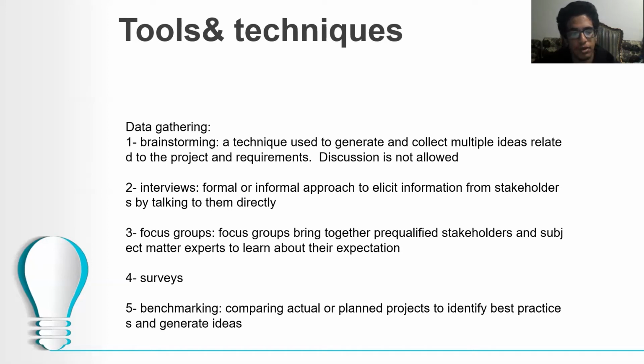The difference between interviews and focus groups: interviews are between two people, one asks and the other answers. In focus groups, there are some discussions. Fourth, we have surveys. Fifth, we have benchmarking, which is comparing actual or planned projects to identify best practices and generate ideas, which means we need to benefit from other people's experience.